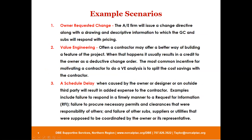When the owner wants a change, the A&E firm will issue a change directive along with a drawing and description, and the general contractor and subs will respond with pricing. After some negotiations, they arrive at a number and that change order is implemented. That's the easy one — the one that everybody does like. Unfortunately, those are not always the case.